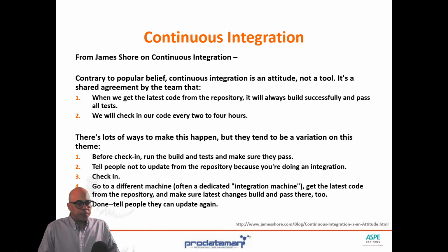All right. So if we set our delivery team tasks at 2 to 4 hour increments, so we don't plan anything less than 2 hours, and anything more than 4 hours, we break into multiple tasks, that would mean that every time we finish a task and commit it to version control, we get feedback in the form of build results and test results.